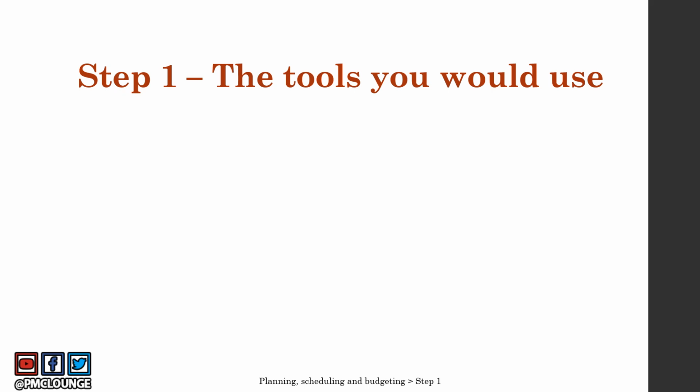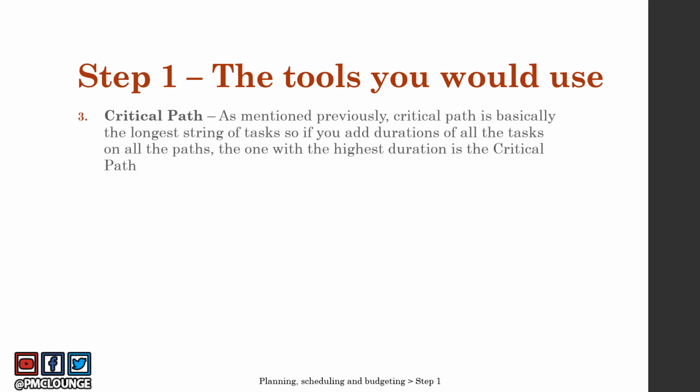When you have tasks in hand, that's the best time to also estimate the amount of time required to complete a task. So with that in mind, let's talk about the critical path. We touched upon the critical path in the previous slide as well. The critical path is the longest string of tasks. If you add the durations of all the tasks on all the paths, the one with the highest duration is the critical path.